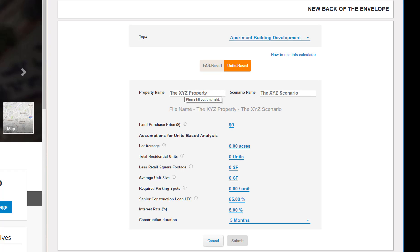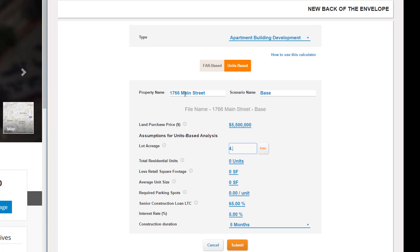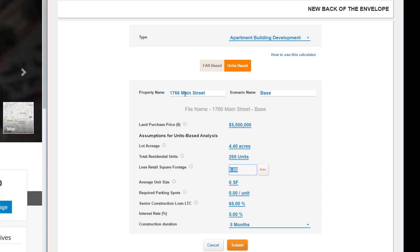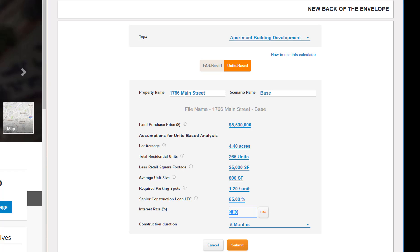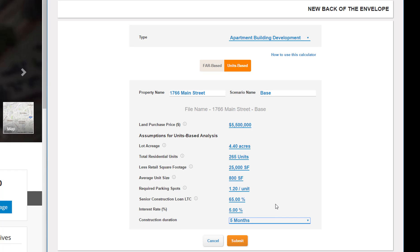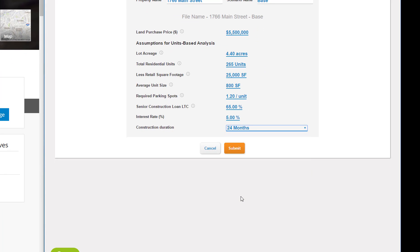I'll fill in some preliminary information: the asking price for the land, 4.4 acres, 265 units (which is roughly 60 units an acre), 25,000 square feet of retail, an average unit size of 800 square feet, and 1.2 parking spaces per residential unit. I'll leave the senior construction loan loan-to-cost ratio at 65% and the interest rate at 5%, put in a two-year construction duration, and click Submit.